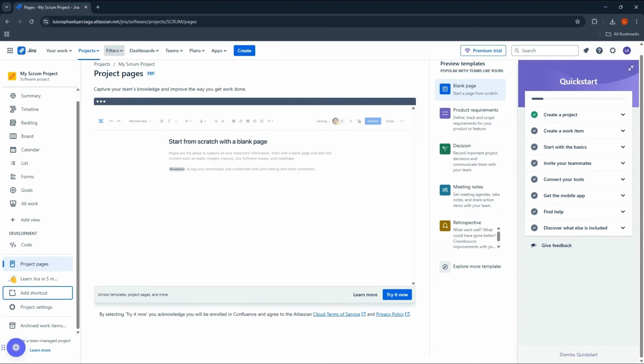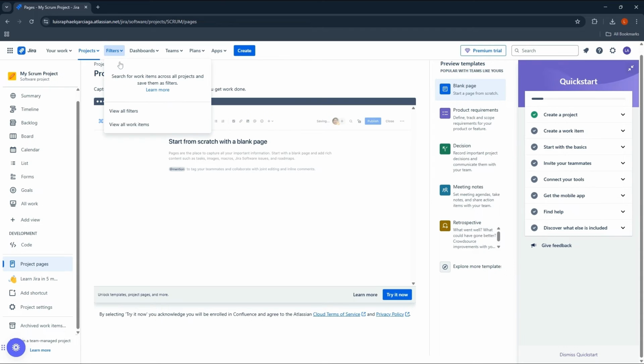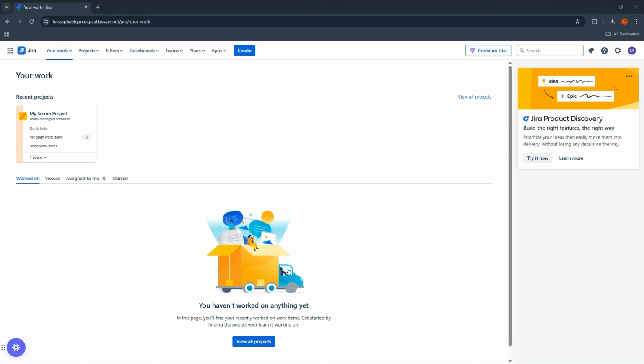2. Choose a report type. Tempo offers several report types including Worklog Report, which displays time logged across various projects and issues. Team Report, which tracks time spent by individual team members. Project Report, which summarizes time tracking for specific projects or epics.